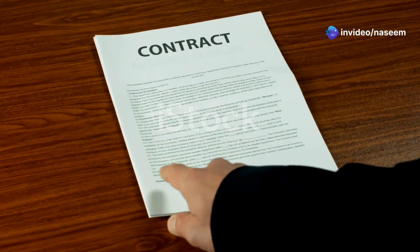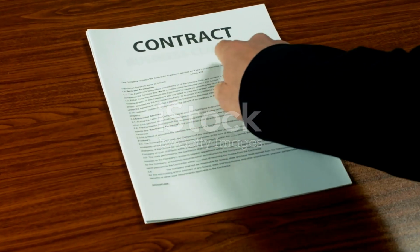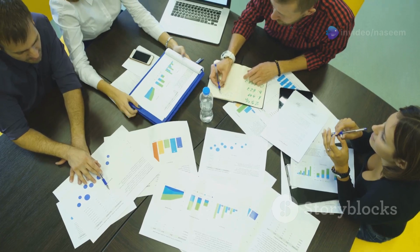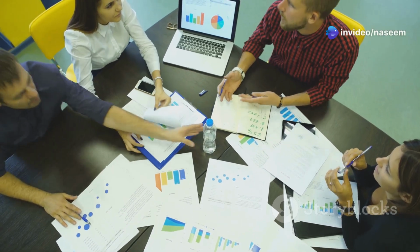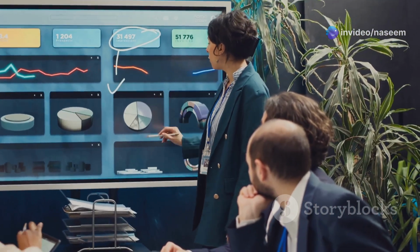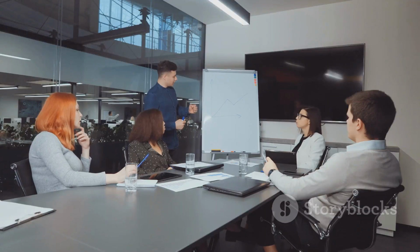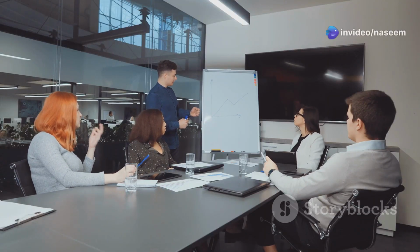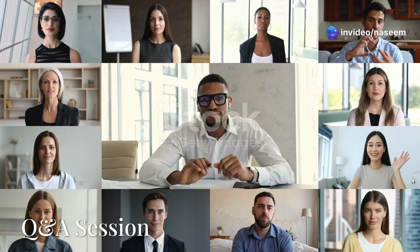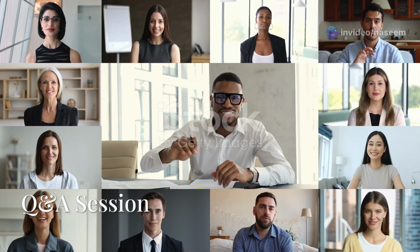Chapter 8. Okay, time to talk about the elephant in the room. Money. Review the contract terms and conditions, and I don't just mean skimming through it. Make sure everyone understands the payment schedule. Are there milestones that trigger payments? What about performance metrics? How is success being measured, and are there any penalties for not hitting those targets? These are crucial conversations to have up front to avoid any surprises or worse, disputes down the line.